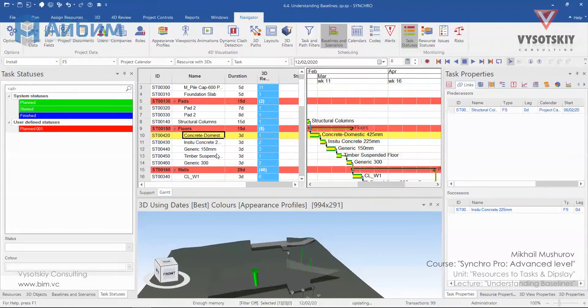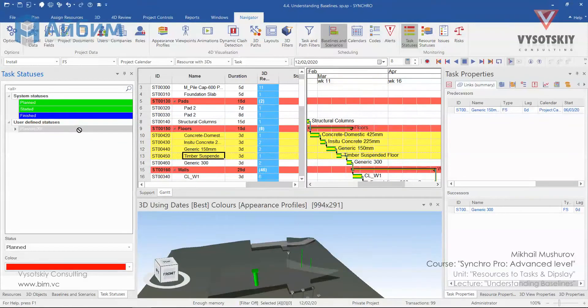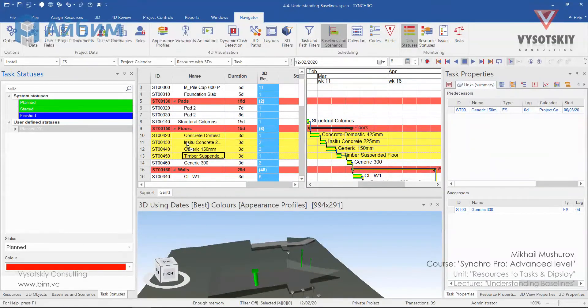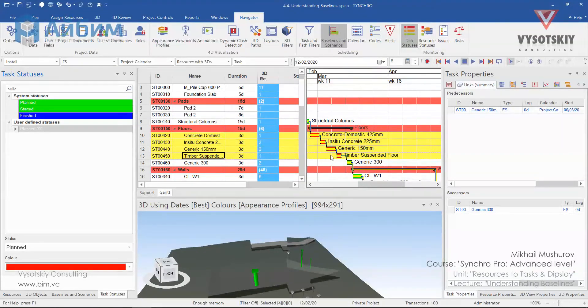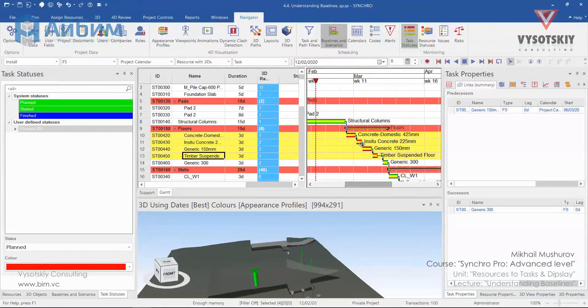Select one or multiple activities and assign a new status to them by dragging it from the task status window and release it over highlighted tasks. You can notice that the color of the bars on the Gantt chart changed.